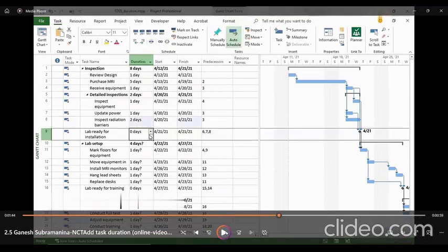Okay, after it is done, I'm going to jump to the duration for task 8, and it is to be 2 days. I have already mentioned 2 days. Task 9 is a milestone. So its duration is set to 0 days. Notice up in the summary task, the duration is 8 days without a question mark. Now you can see here, the duration is 8 days without a question mark. When all the subtasks for the summary task have values, the question mark goes away on the summary task.